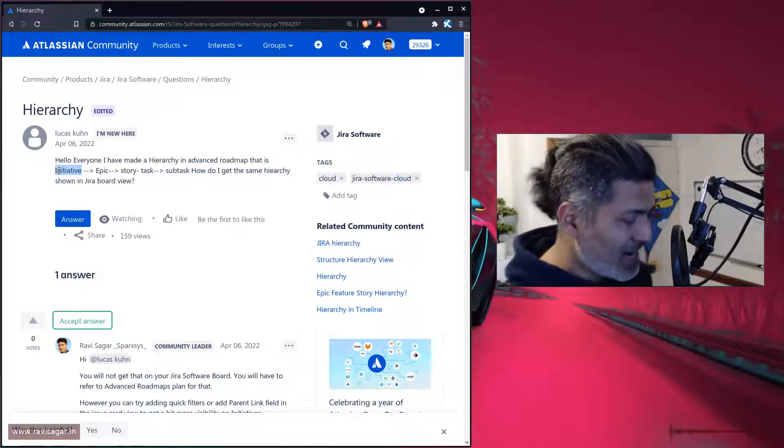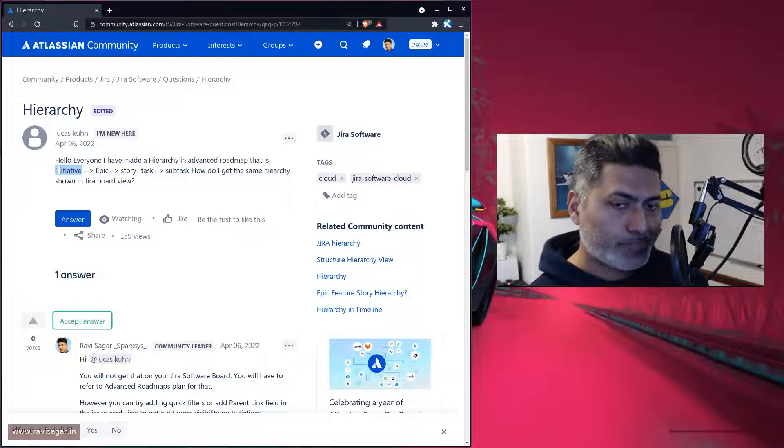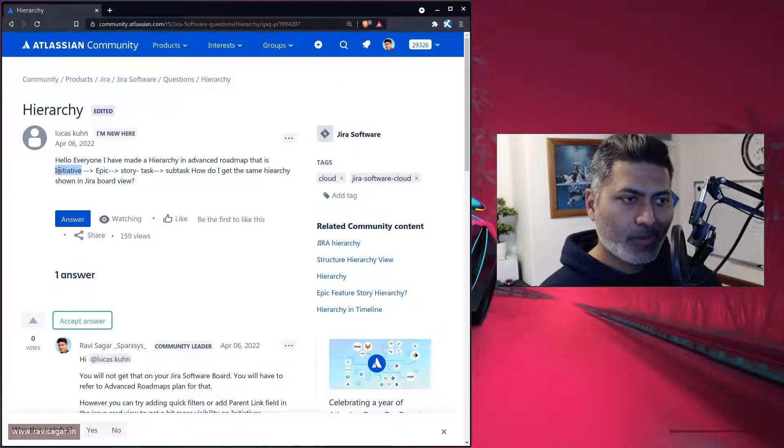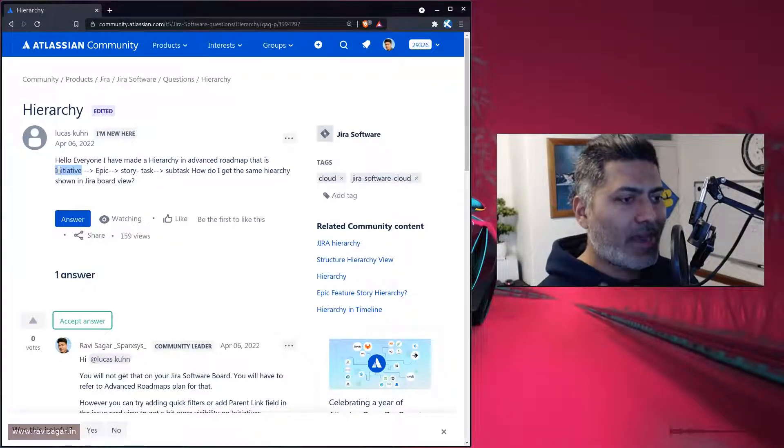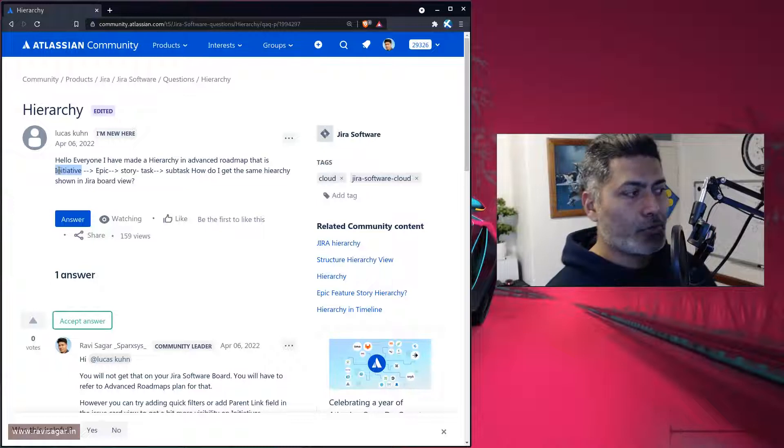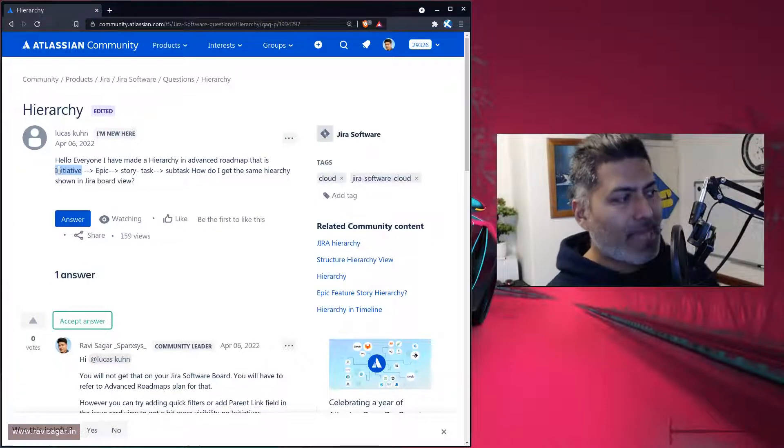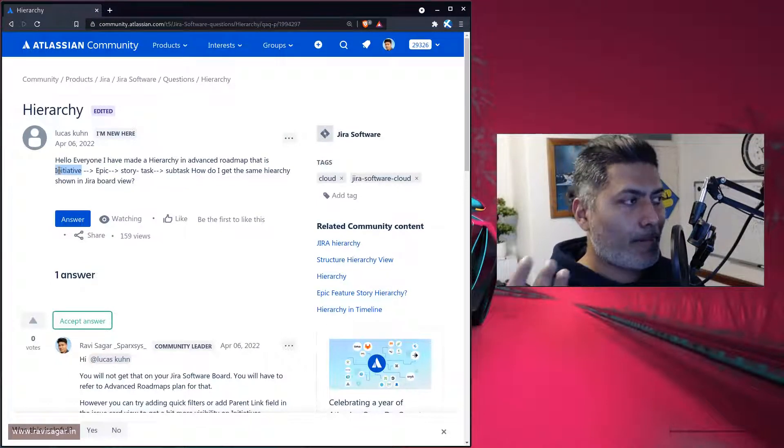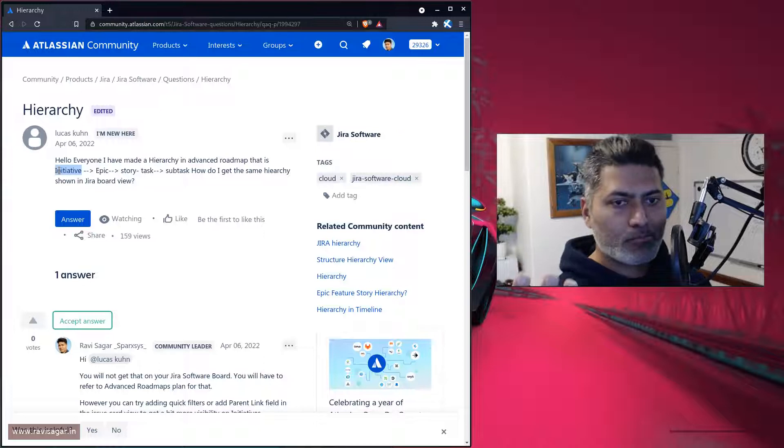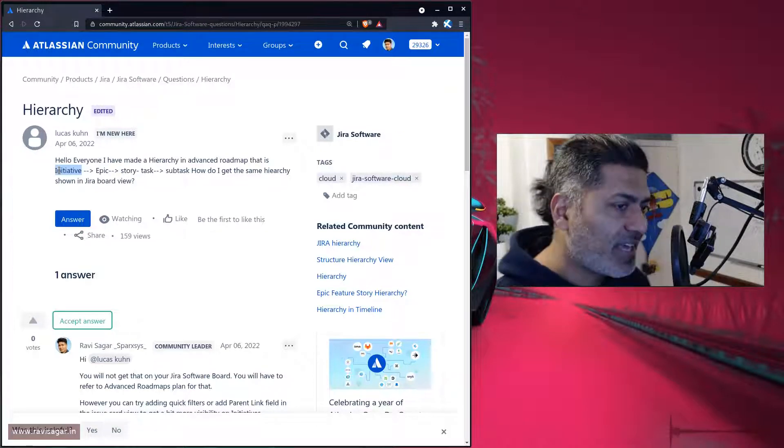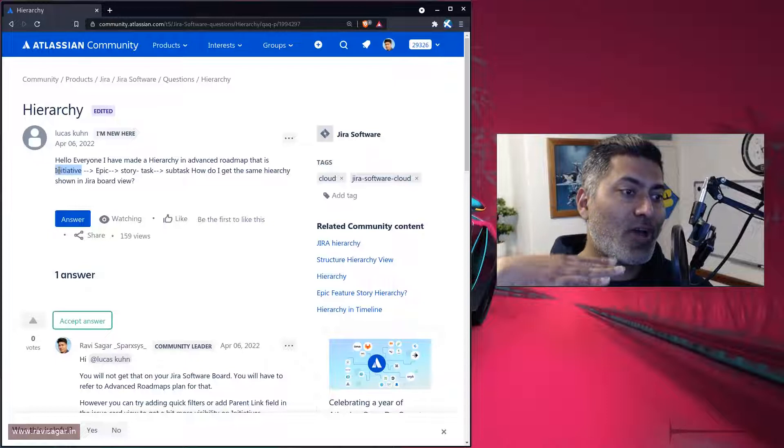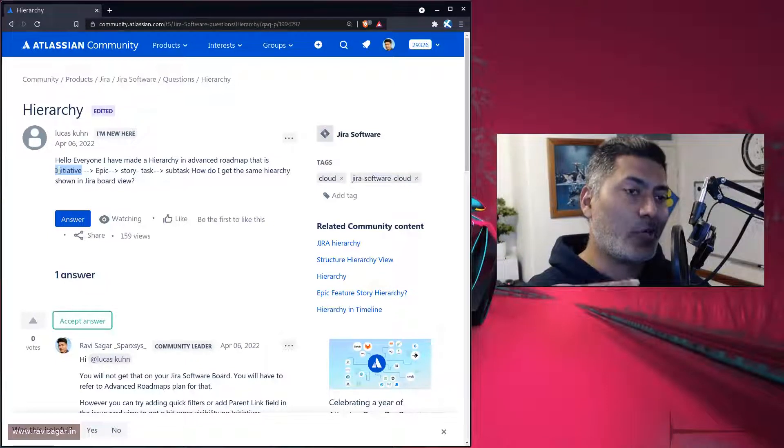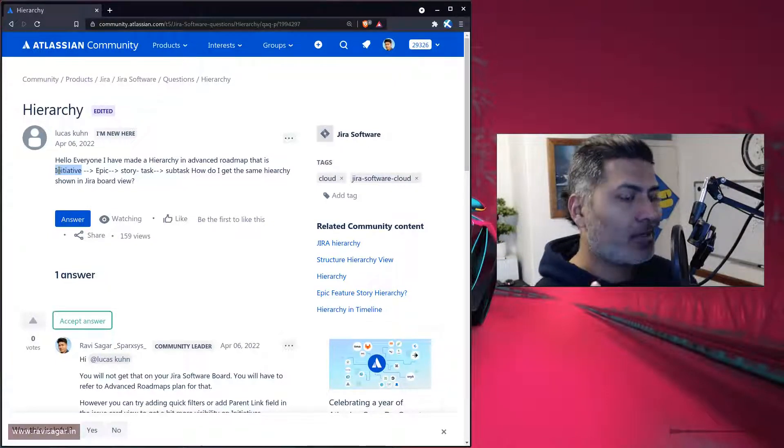But when you're looking at your Jira software board, you do have some hierarchy, but that is limited to epic, story, and subtask. You don't really get those other issue types that you have defined in your advanced roadmap configuration.